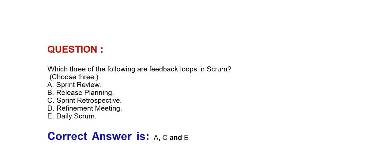Next question: Which three of the following are feedback loops in Scrum? Choose three options. Option A: Sprint Review. Option B: Release planning. Option C: Sprint Retrospective. Option D: Refinement meeting. Option E: Daily Scrum. Correct answer is Option A, C, and E.